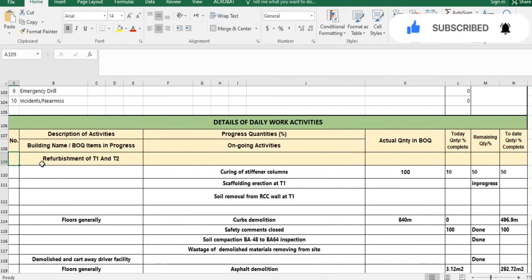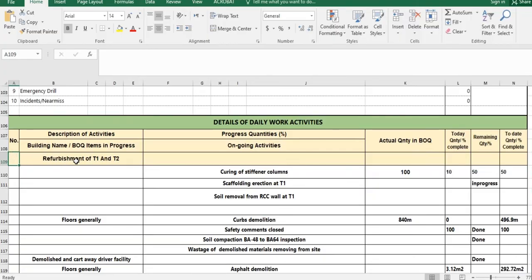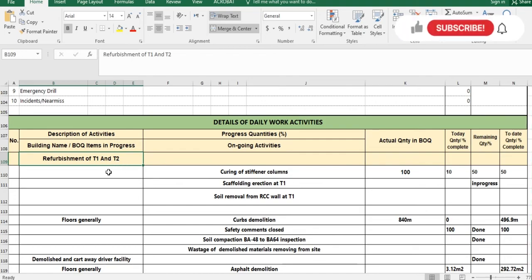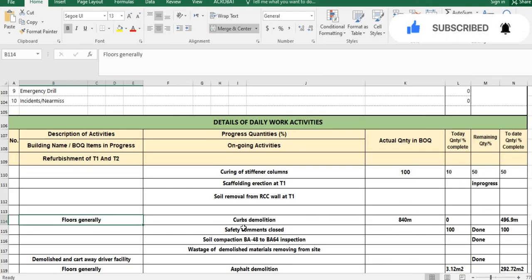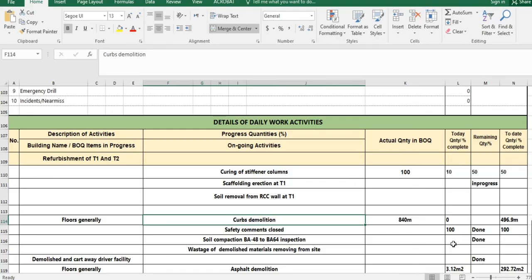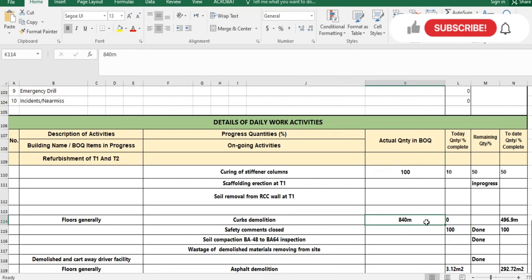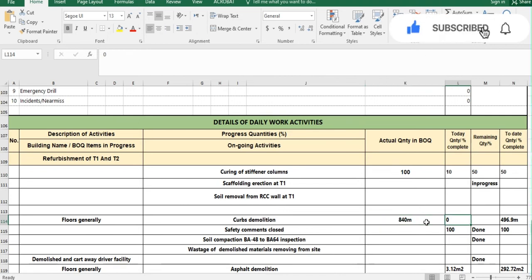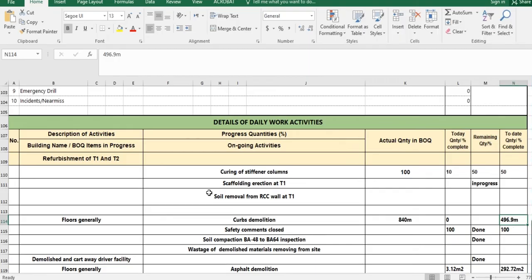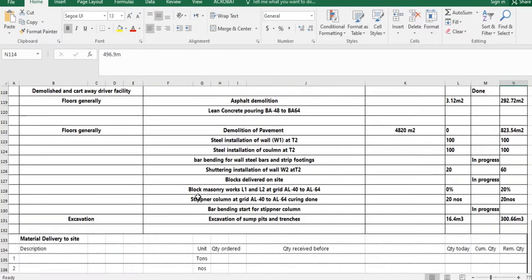To expand on the activity section: serial number, then the building name or activity name as in the BOQ — for example, refurbishment of Terminal 1 and Terminal 2. In the next area, write the specific activities going on at site, the actual BOQ quantity, what you did today, the remaining quantity, and the total quantity completed to date.